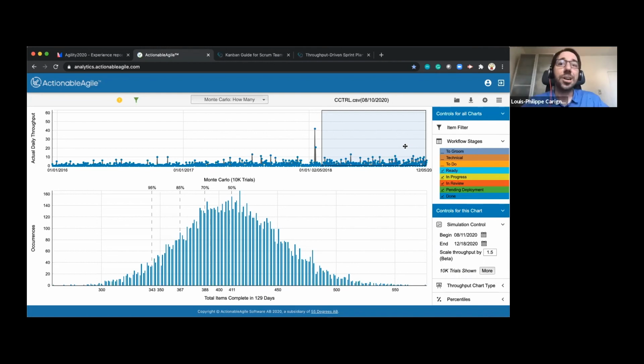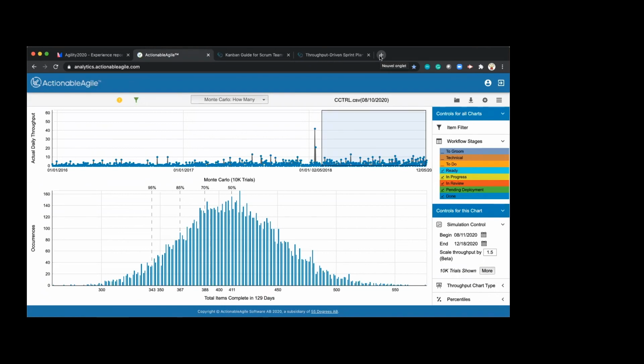And after 12 data points, I can go and plug in a pacemaker here. After only 12 data points or completed items, you'll have enough information to do your forecast. Your 85% will be valid after only 12 data points. Okay. Have you seen any project using just cycle time, whatever you were told, and been successful?